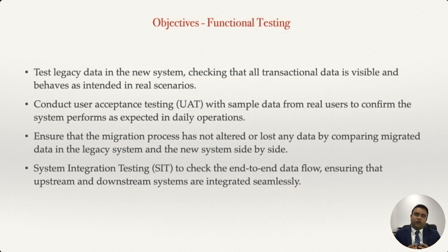Despite having a small amount of data for your initial test iterations, I would recommend to incorporate functional testing as soon as possible in your iterations. If you're only migrating one type of data, let's say you're only migrating patients or customers' master data, try to compare them on your legacy and the target system as soon as possible. That way, all the potential issues will surface sooner, all the showstoppers will come out as well, and you will have enough time to react, report, and eliminate that issue.